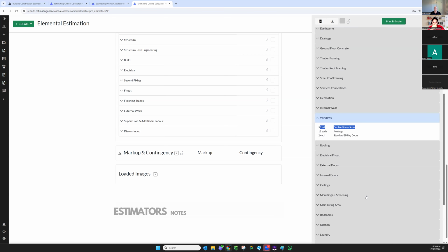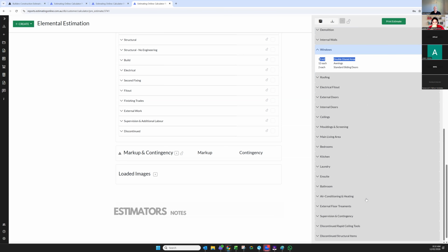This is very good to understand what has happened. This is not the bill of quantities. This is setting up the estimation. Because what sometimes happens is we might have 33 square meters added, but we got to add waste. So in some of the items, we add waste into our bill of quantities, but this is a starting point to understand what we've done.